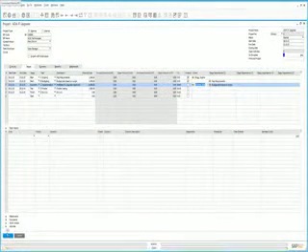expenses. If we move to the Documents part of the project window, we have the ability to select a delivery document, for example, and corresponding AR invoice to a particular project. Julie Bowens has worked 10 hours on this particular project for the implementation stage, so we can actually invoice 10 hours of labour items. So let's now select the delivery document that we created by simply selecting the right document type and the right document number that's assigned to this project.